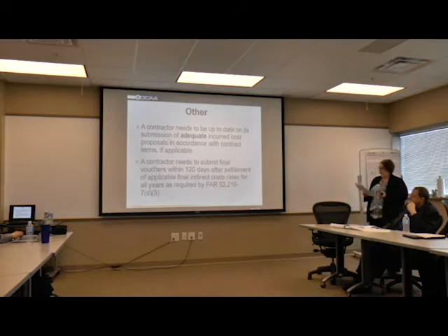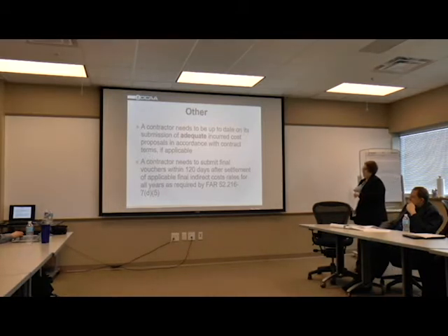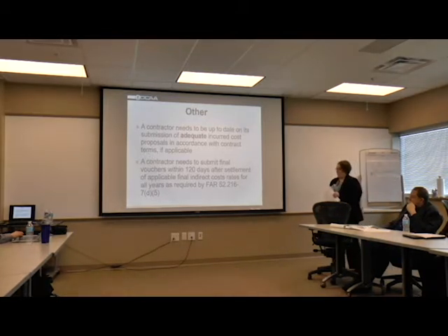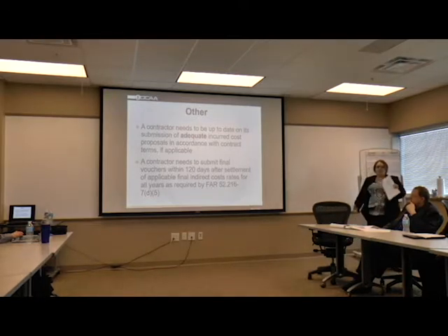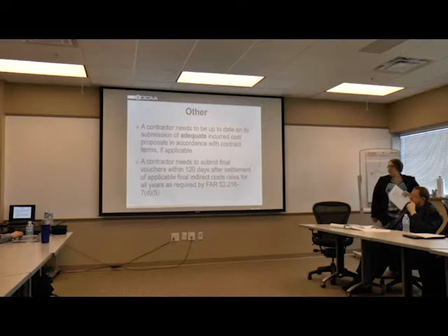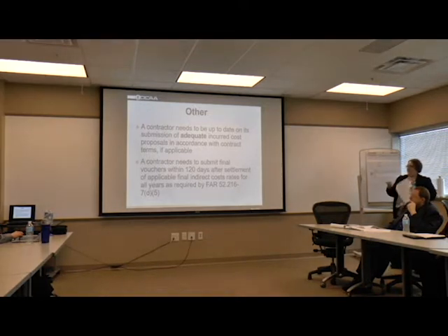A contractor needs to submit final vouchers within 120 days after the settlement of the applicable final indirect rates for all years required by FAR 52.216-7(d)(5). So once all those final rates have been established and that contract has come to an end, you have to submit that final voucher.